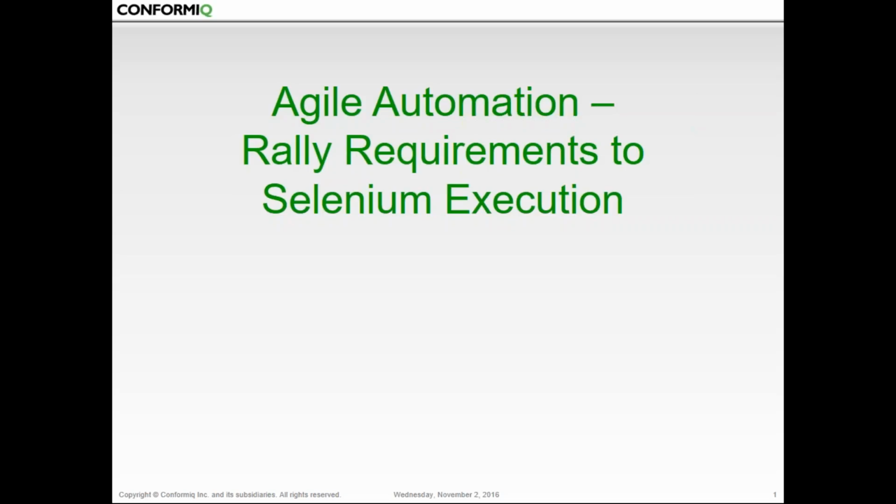I was just recently talking to someone I know at a major telecom company. They were creating a cloud-based application, a monitoring application for cloud systems, and they could develop it at Agile speeds. He was responsible for the program, and there was no issue with the development side, but the testing was not done in an automated way. It was manual, and it fell further and further behind because it got more and more complicated to test manually. Because of the delay in testing, they missed their delivery windows, and when they missed their delivery windows after a few releases, the company canceled the program and fired them all.